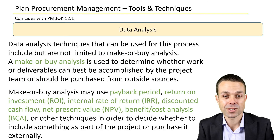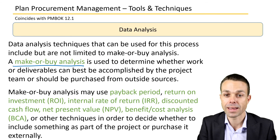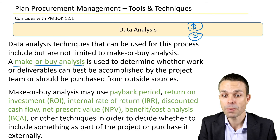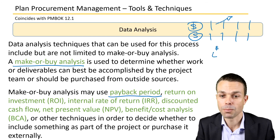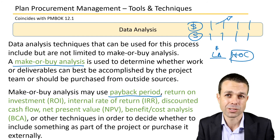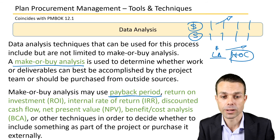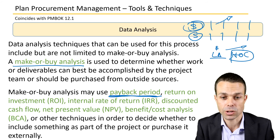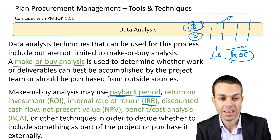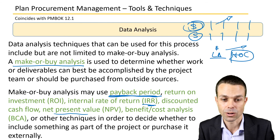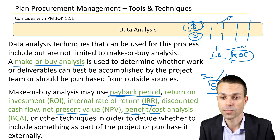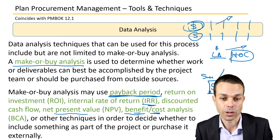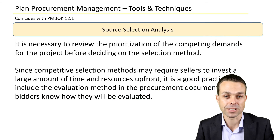Data analysis includes make-or-buy analysis, where we look at how much it costs to make versus how much it costs to buy, plus ongoing costs. That ongoing cost determines the payback period — if we buy it for a low amount but it has high ongoing costs, it may actually cost more in the long run. Financial analysis tools that can be used include return on investment, internal rate of return, discounted cash flow or net present value, and cost-benefit analysis. For example, if the benefit is five million versus one million to buy, our cost-benefit ratio is five to one.